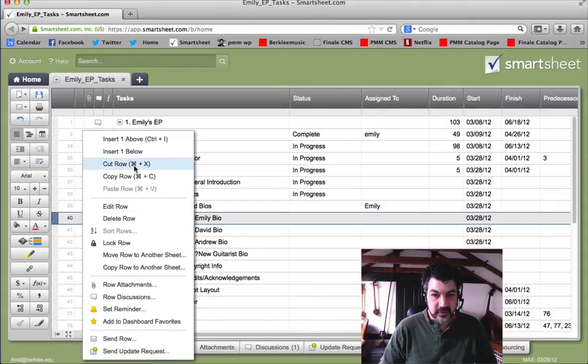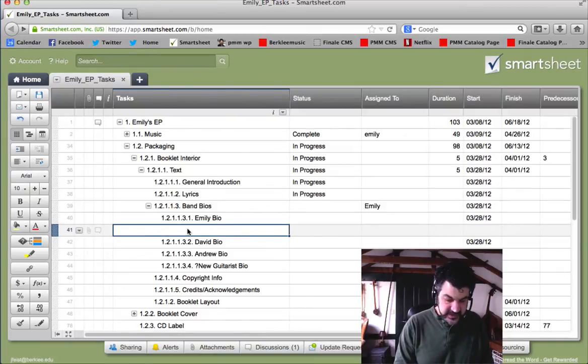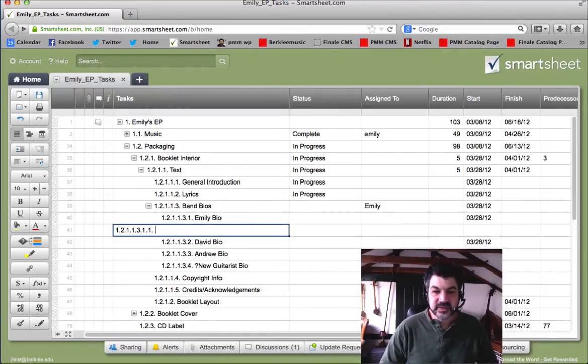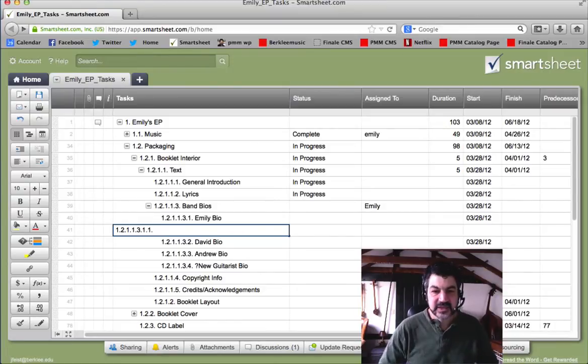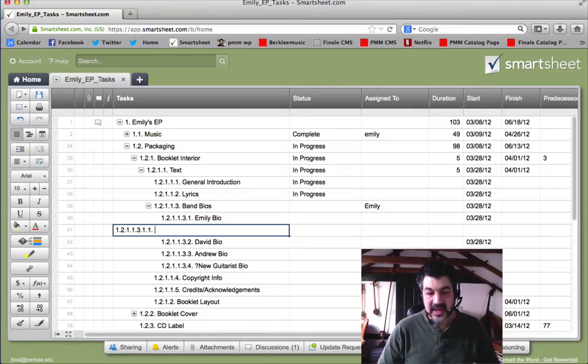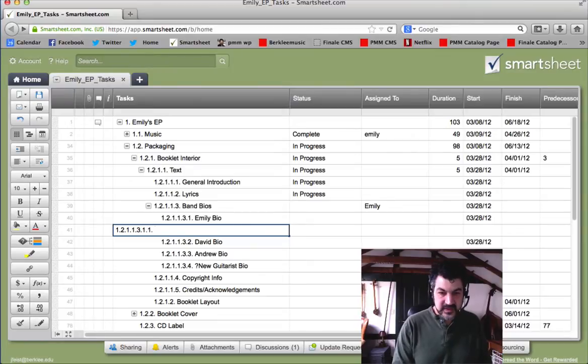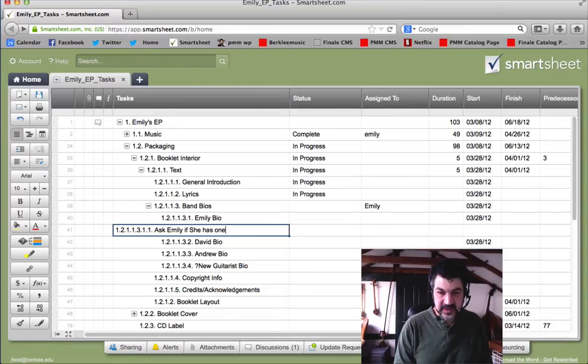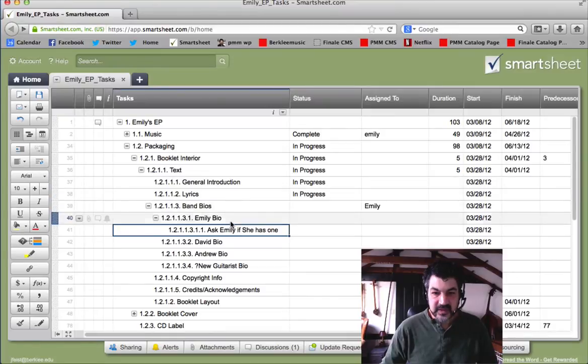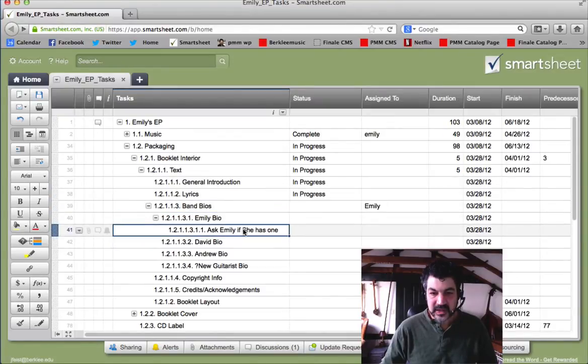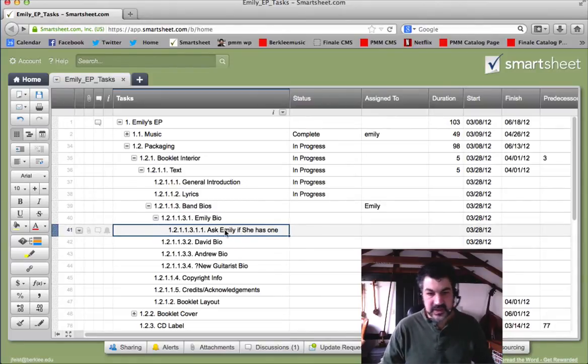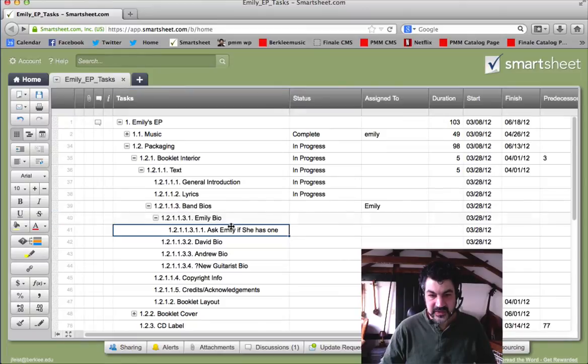So to add a row for the tasks, I'll add a row below here. And I like to keep the numbering scheme going. So ask the question, what's the first thing that we have to do? What's the very next action that we have to do for Emily's bio? If I'm managing this project for Emily, I might ask Emily if she has one. That'll be a task. So that's something that I have to do today. I have to contact Emily. We've gone from a noun, which is Emily's bio. Now we're working on verbs or directions. This is an action rather than just a thing.